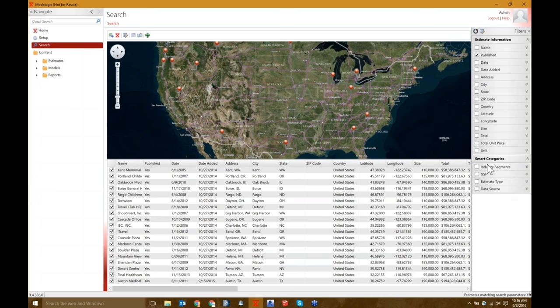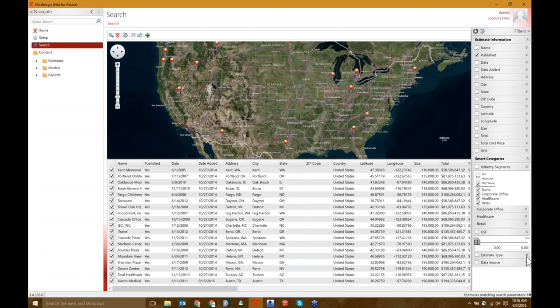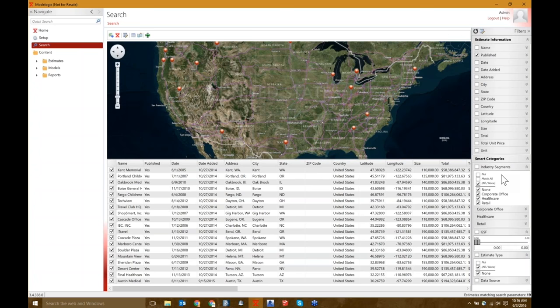I can get some data from the project just from looking at this sheet as well. I can see the industry segment, the size of the project, any metrics that are very key, like gross square footage or contact area of skin or ratio of shell to skin. So the first thing I would do is go into my estimate information or my smart categories. So estimate information or metrics that you would input for each project as you're importing them, basically giving them the name, the date, the address, size, longitude, latitude, so on and so forth. Another section that we can use to sort our projects is smart categories. So the smart categories are basically things that you would set up specifically for your company.